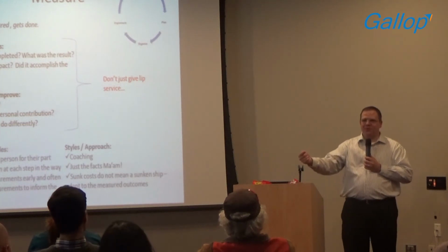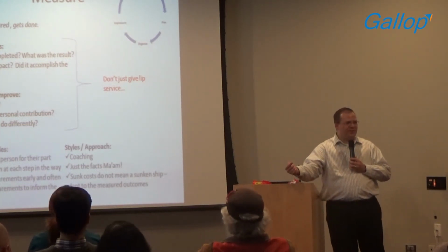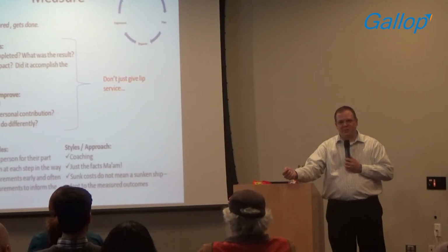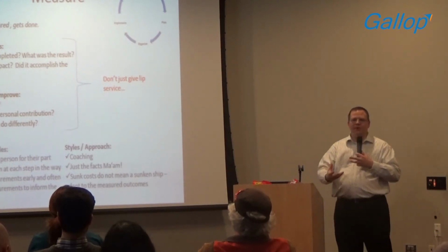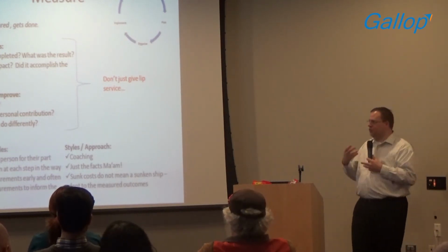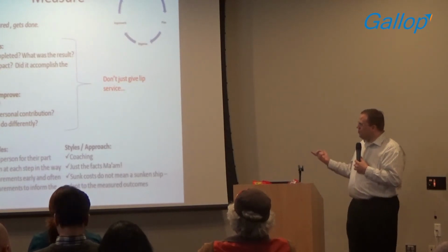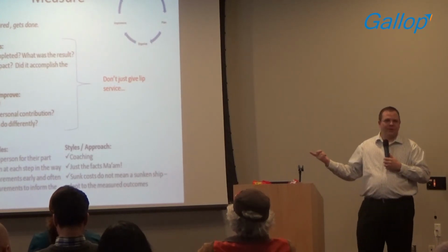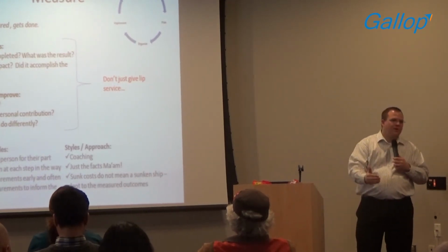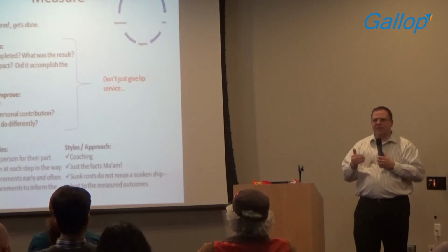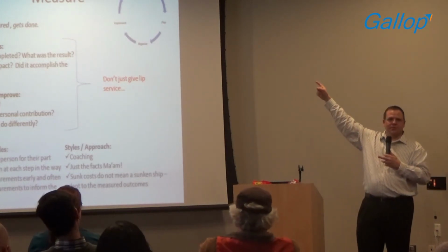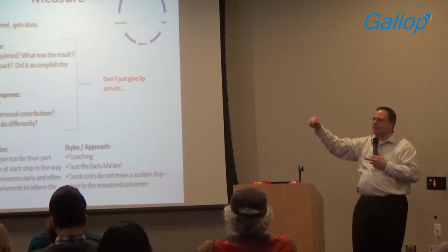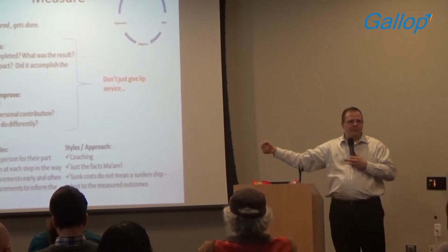And the next time you go to estimate what the next project's going to be, don't go to them and say, I can get this done in 3 days, when you know it's going to take you 5. Right? So measure the outcome and allow the measurements to inform you of how to move forward. And the third part of it, and this is really important: sunk costs do not mean a sunken ship. If you've invested a lot of time and effort into something and it's just not getting the fruit of what you thought it was going to be, go back to planning. Go back to assessment. Don't just keep going after the same thing.